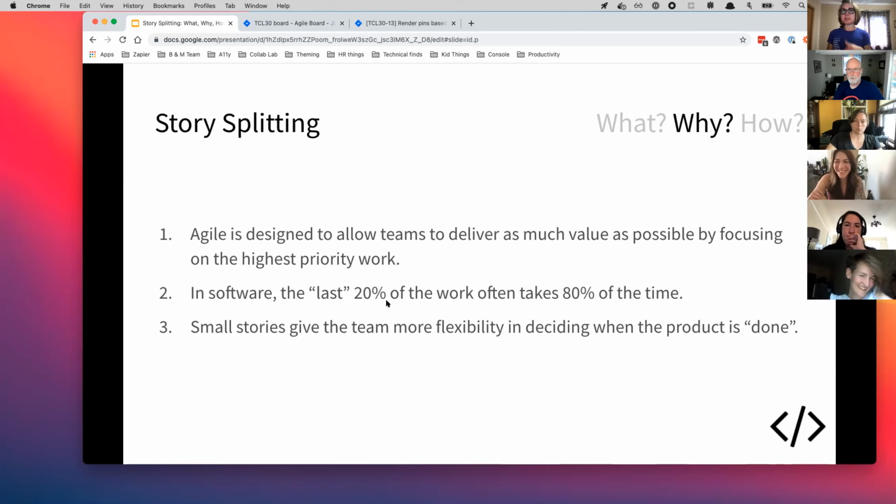So as we go through these sprints, these iterations, we can decide, maybe this is good for an MVP. We've delivered all of these really high priority features. The product owner can decide, do we really need these last two features, or can we release this product now, get some feedback from our users, and maybe discover that those features we had in mind at the beginning weren't really that necessary or important to users.